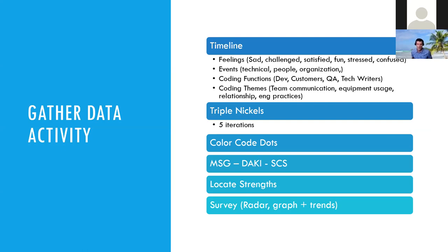So let's think about the way we can gather facts. We would like to do it in an organized way, simple for actually everybody. So the timeline here is the basic thing. It's for starters. We are looking for things that happened in those 2 weeks, and we just do it with post-its. On that day, I recognize something. Or we can say the facts of the usage of servers, or something crashed on that day, and we can further on find that the release was 2 days earlier or something else.